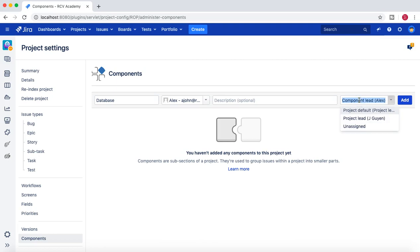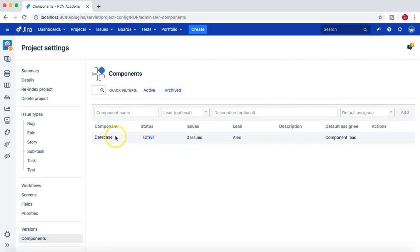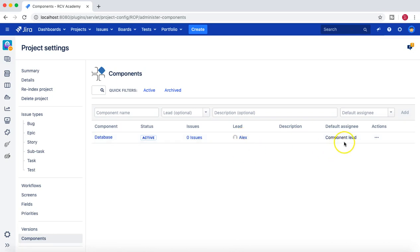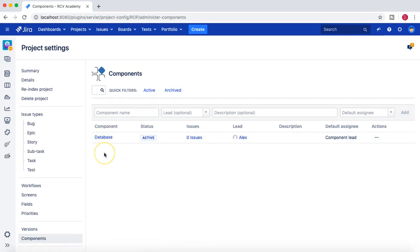For components, you can choose 'Component Lead' as the default assignee. So if someone creates an issue and selects the 'database' component, LX will be the default assignee. If no component is chosen, the default assignee falls back to the project lead, which is JQN. This is an effective way to organize issues and ensure they get assigned to someone and actioned promptly.